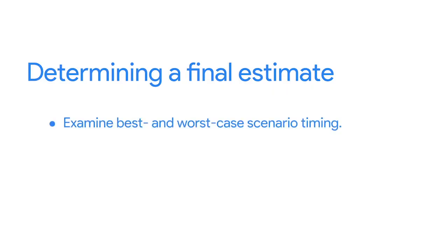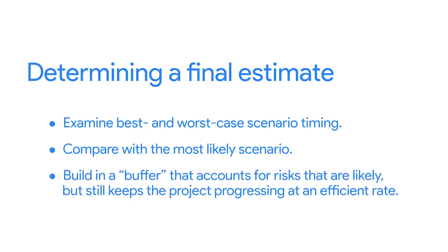So, you want to examine the best and worst-case scenario timing and compare these with the most likely scenario. From there, you can build in a buffer that accounts for risks that are likely, but still keeps the project progressing at an efficient rate.